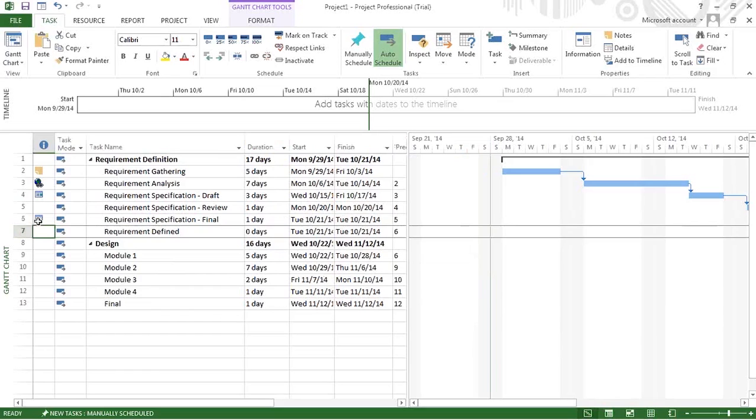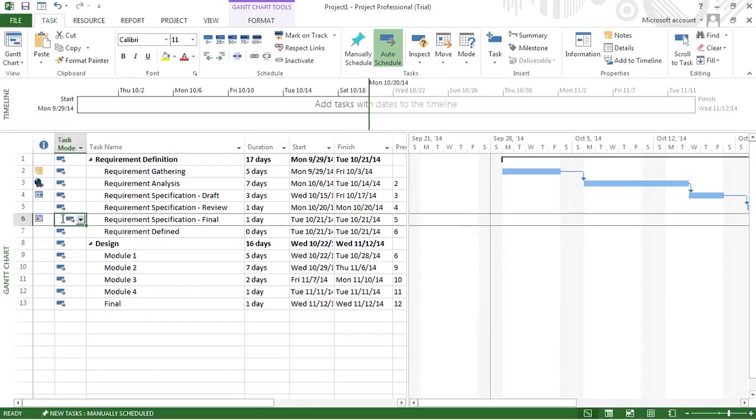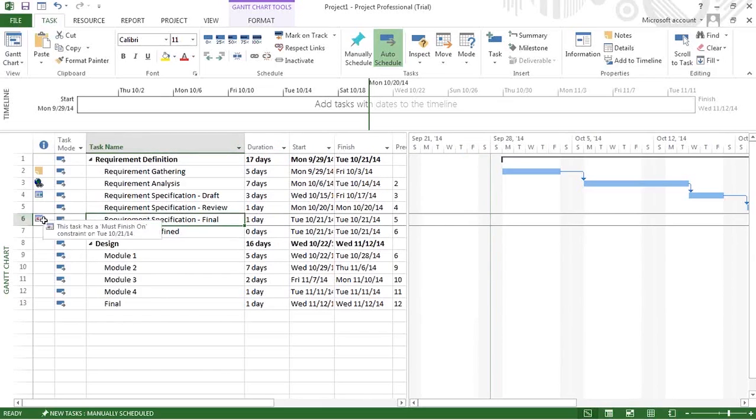Another project may have a dependency on you and they need to finish within their timelines. For that, they may give you a constraint. Since it is an external project, you will not have the predecessor for that. In that case, you can put a manual constraint saying this task has to be finished by a specific date.